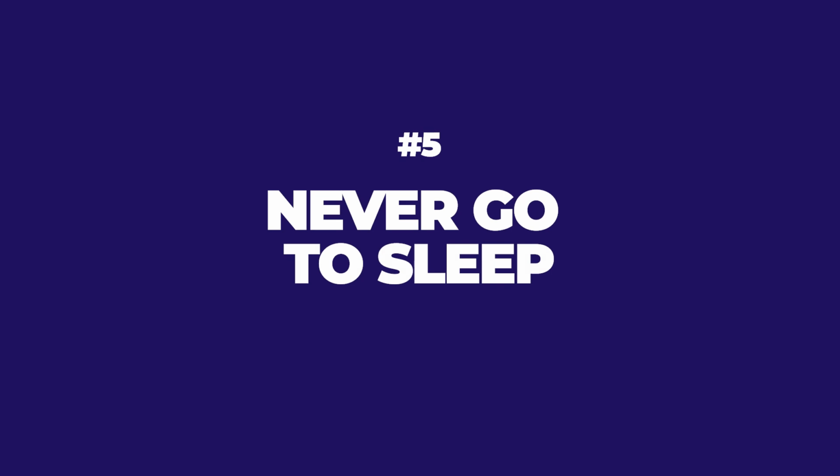And number 5, when it comes to procurement, is never go to sleep on your most critical procurement items. Always add in a buffer and make sure the design team and the owner and everybody knows about it and it is a hot item in front of everyone at all times. It doesn't matter if we can optimize the production of a project if the switchgear is the bottleneck on the project to start with. So it all has to be considered within the overall framework of the plan, and the timelines have to be managed. And as a great general superintendent once told me, do not fall asleep when it comes to those timelines.